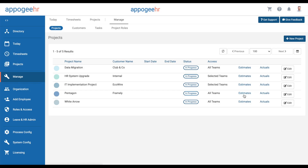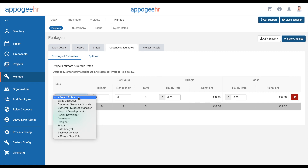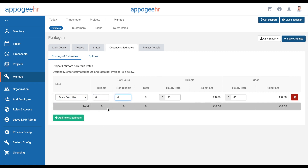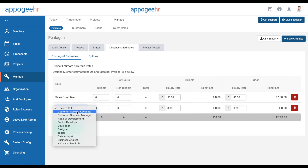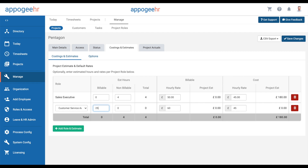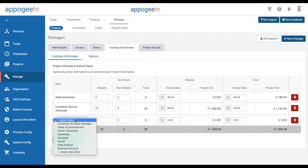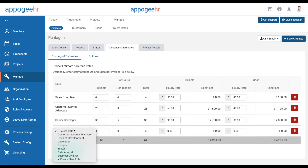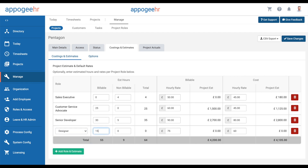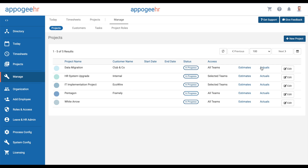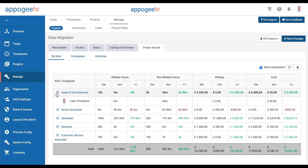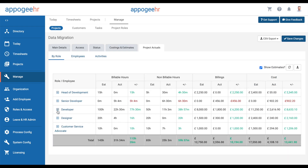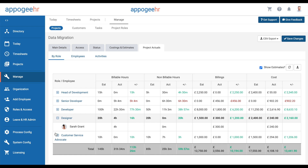Project managers can plan projects by adding estimated time spent per role. This will give you a rough cost for your project. When employees track time against the project, your actuals will populate to keep you on top of your project spending.